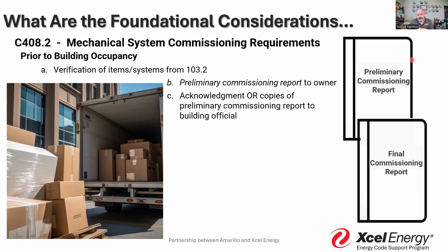Now, the reason we don't wait for final commissioning is there may be some nuanced differences that are outside the scope of our conversation. It's the same thing we see every once in a while in a normal residential home, where this is not a code safety issue, but it is a contractual issue. You need to deal with it, but I'm going to issue the CFO. Not a temporary, a real CFO. And it's a similar concept here.